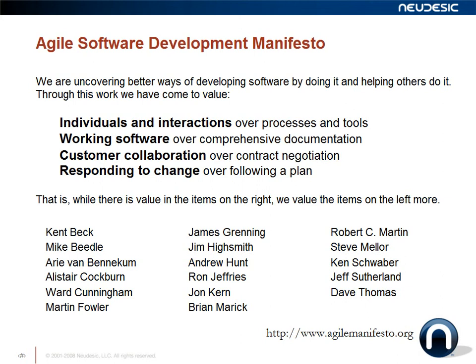The next value is customer collaboration over contract negotiation. In the waterfall world, your requirements document when signed off becomes the contract the business holds the team to. In agile projects, we focus more on collaboration throughout the entire life of the project, not just in the requirements phase. You'll have a list of initial features and functionality, and working with the customer and understanding their values over the life of the project, you'll collaborate to produce the product that provides the most value.